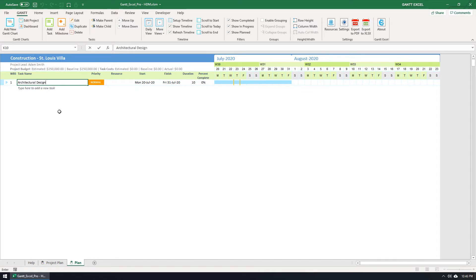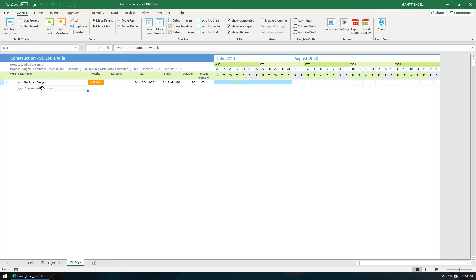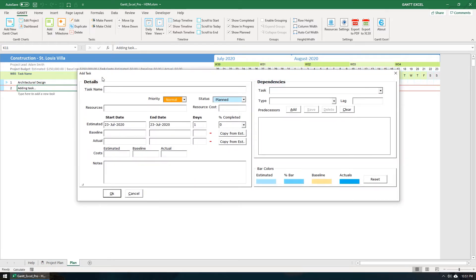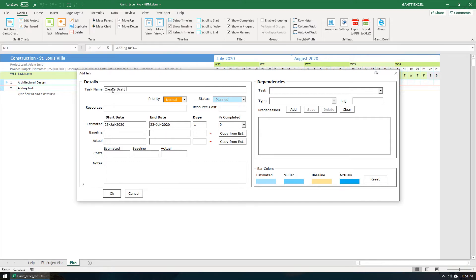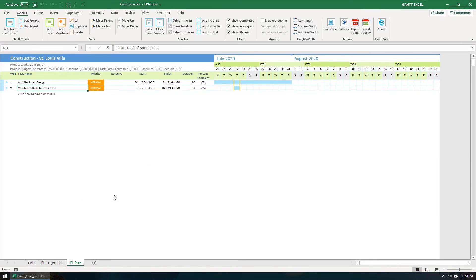Now the first method is to click the Task Placeholder cell where it reads, Type here to add a new task. Click on the Add Task button in the Gantt menu. Type in the task name. The start date is set to Today by default. Click the OK button when done. The task is added to the Gantt chart with the default duration set to One Day.